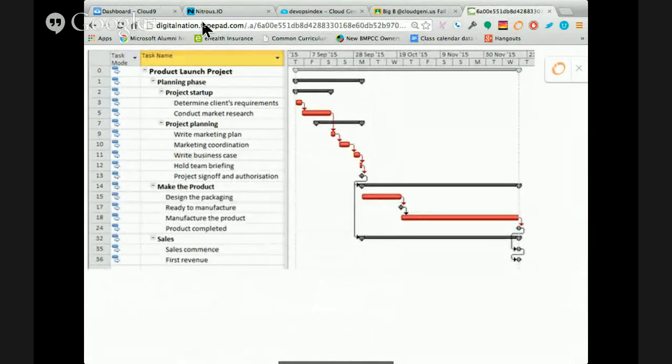So this is a Microsoft product. It is called Microsoft Project, and it essentially shows you a product launch. In this example, a product launch project, and they have defined some stages and some timelines. The black lines have some slack. The red lines do not have slack, and slack is exactly what it means: a room for slacking off. No slack in red. Black has some slack time. Red does not. So red becomes the critical path, and you want to make sure to exploit